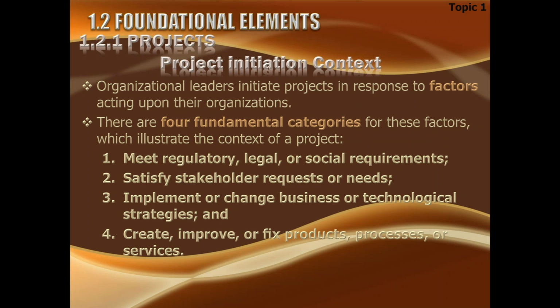There are four fundamental categories: meet the regulatory, legal, or social requirement. Maybe the new regulation has come up, and that requires you to update your way of working. So maybe the new regulation has to be implemented, and the organization has to bring in certain changes so a project can be initiated. Maybe the stakeholder or the customer requests a change, or their needs have changed, so therefore